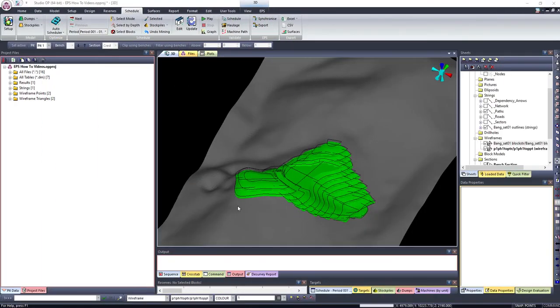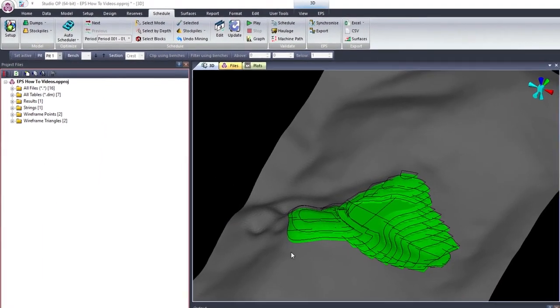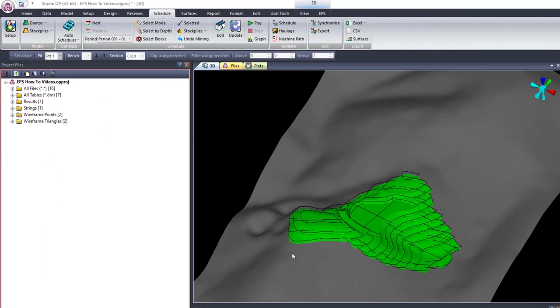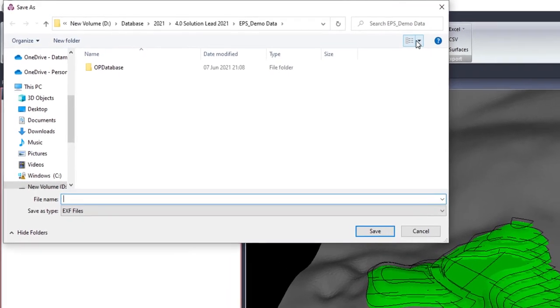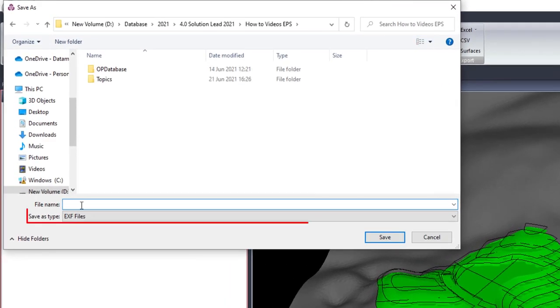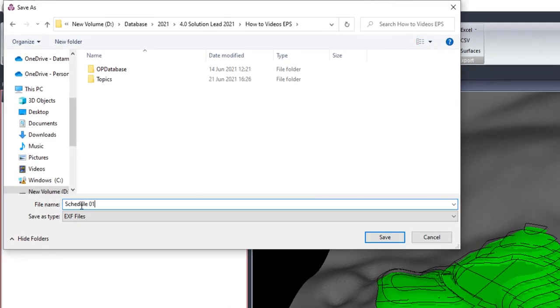Once all is set up, you have the option to export to EPS or to synchronize with EPS. The export function creates an EXF file that can be loaded onto EPS on another workstation.